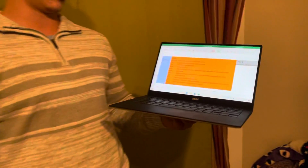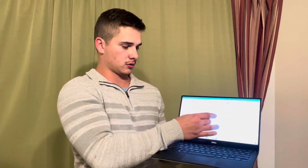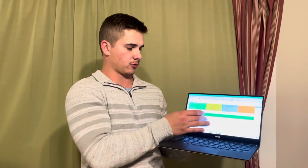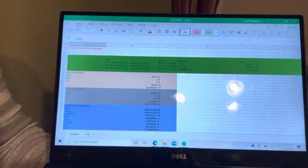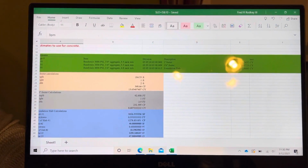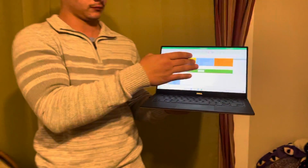So pretty much the overview for day 4 hits that the trucks arrive, the slab on grade concrete, as well as finishing that concrete. And then day 5 is an open schedule for the project manager to monitor the conditions of the concrete. And down at the bottom of my schedule, I included the estimates from SL04 to show in the schedule the type and amount of concrete and the conversions for all the concrete calculations.